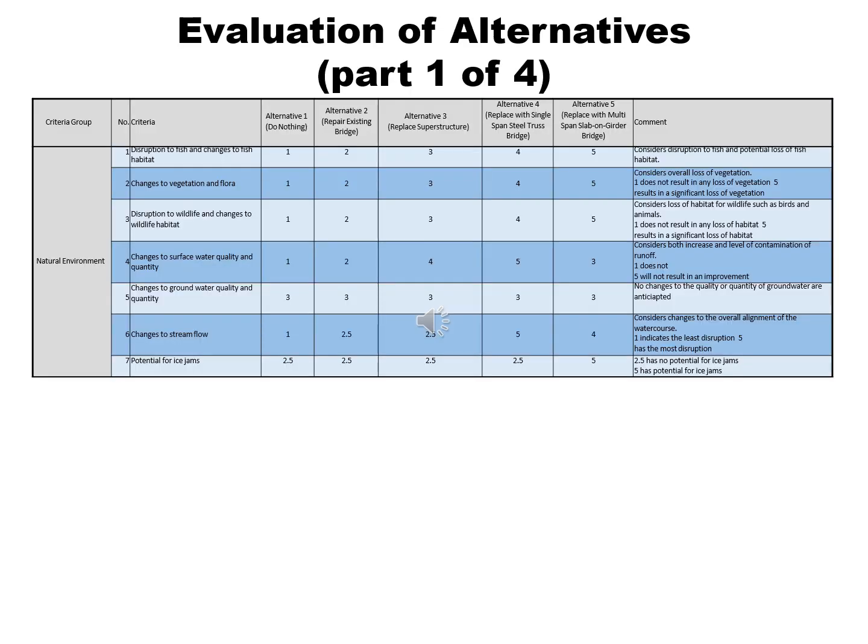The evaluation of alternatives, part 1 of 4. This slide and the 3 slides that follow evaluate 5 separate alternatives on a total of 40 separate criteria. For each criteria, the alternatives are ranked from 1 to 5, with a ranking of 1 having the least disturbance and a ranking of 5 having the most disturbance, except where noted. Each row totals 15 points to ensure each criteria is weighted the same. The five alternatives are: Alternative 1, do nothing; Alternative 2, repair the existing bridge; Alternative 3, replace the superstructure; Alternative 4, replace with a single-span steel truss bridge; and Alternative 5, replace with a multi-span slab on girder bridge.